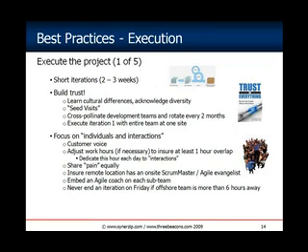So with most offshore teams, it's relatively easy to accommodate at least a 1-hour overlap, and we'll talk a little bit more about that in just a minute. Also plug in a Scrum Master, an Agile Evangelist, or Agile Coach at each team, remote location and local location. And finally, never end an iteration on Friday, because the remote team may end up working late Friday nights every 2 weeks or something.